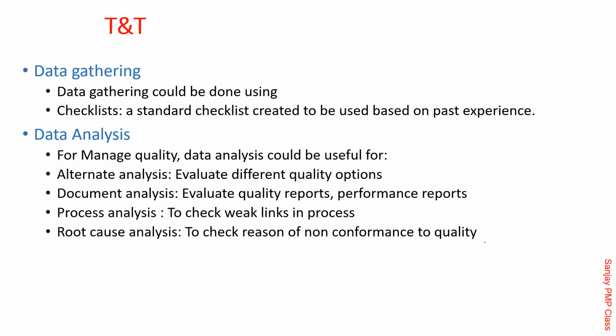Tools and techniques: data gathering. A lot of data needs to be gathered for doing the audit. Sometimes there is a checklist. Auditors come up with their own checklist, saying that when you come to your project, can you show me the project plan? Once you show that, he will open his pad and say, now the risk register, show me. He might look at each of them and check. So a checklist is very commonly used so that you don't miss any parameter in the audit.